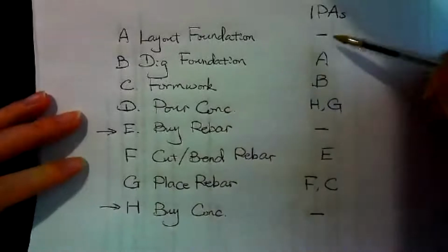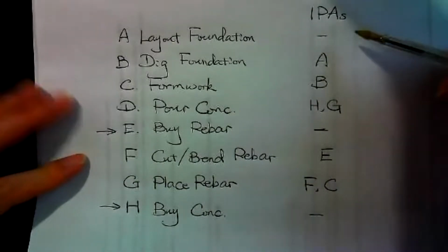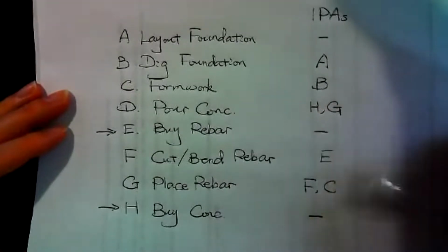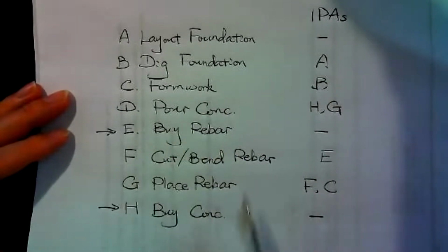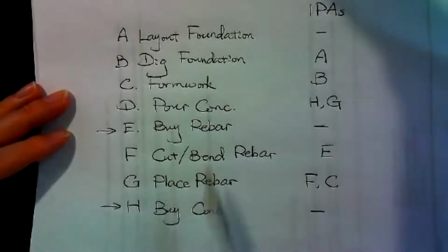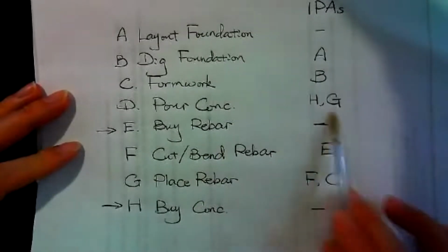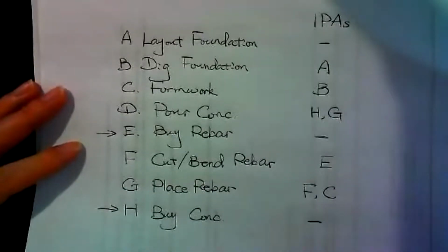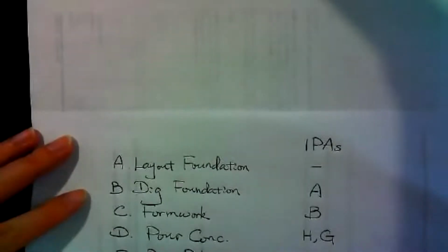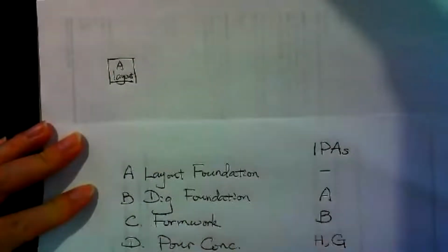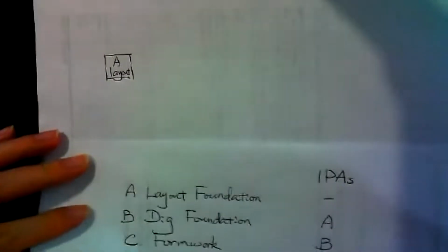So based upon the table, first we read which activity is the starting point. There are 3, okay? But buy something, we're gonna draw that later. Buy something, procurement activity is not a real start. Real construction starting point is over here. So on my precedence diagram, the first activity I drew is this A, layout. Okay, that's the first activity.